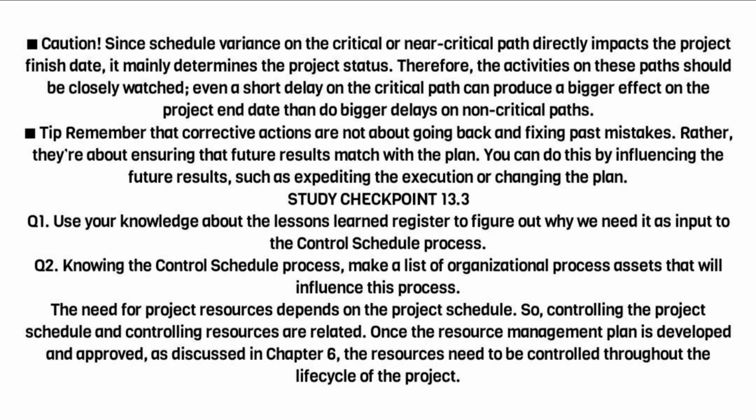Caution! Since schedule variance on the critical or near-critical path directly impacts the project finish date, it mainly determines the project status. Therefore, the activities on these paths should be closely watched, even a short delay on the critical path can produce a bigger effect on the project end date than do bigger delays on non-critical paths.